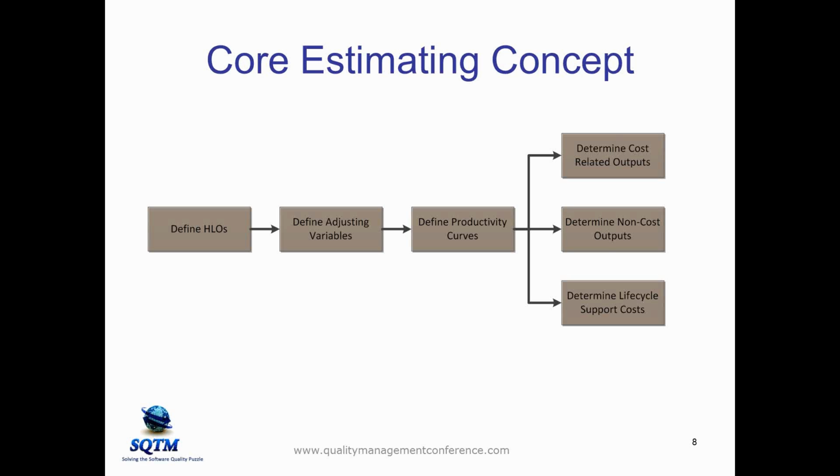So we start with the types of activities we have to do: project management, development, testing. We go through and make a list of activities so that we can identify the roles, so that we can identify the role owners, so that we can get those role owners to tell us what their work component will be.